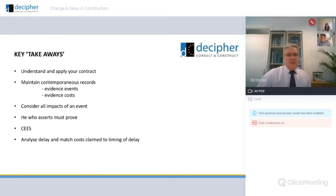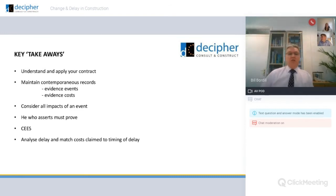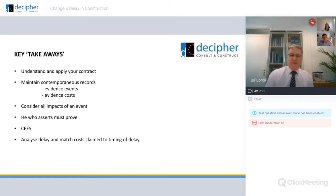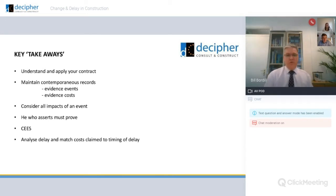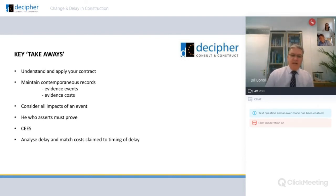Key takeaways: it depends, so understand and apply your contract and how it has been amended. Prove what you're claiming — maintain contemporaneous records, evidence your events, evidence your costs. Consider all impacts and events and the knock-on effect that might affect later works. He who asserts must prove — the onus is on you to prove what you're contending. Think of the C's: cause, effect, entitlement and substantiation. And finally, it's really important to analyse the delay and then match the costs claimed to the timing of the delay.